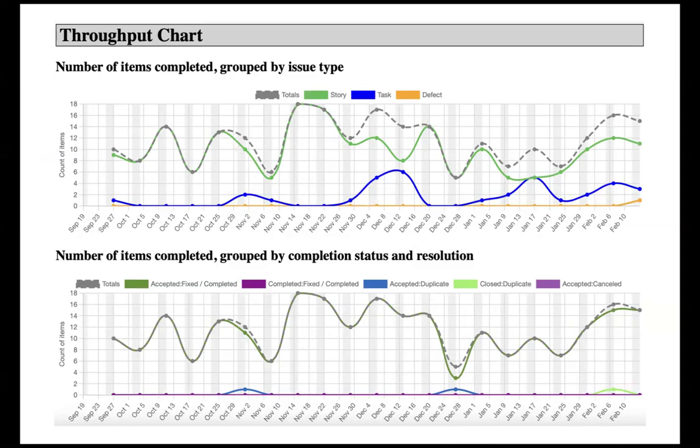We can see that we don't have a lot of defects here. That doesn't mean that this team has high quality. It means that they've only worked on one defect in this time. They've only finished one defect across this entire period. But that doesn't mean that they only worked on one because they had really high quality. It could be they only worked on one because they're completely ignoring bugs and racing to get other stuff done and they've completely ignored quality entirely. So this doesn't tell me anything about the quality of our system. It just says we've only finished one bug in this 90-day period.